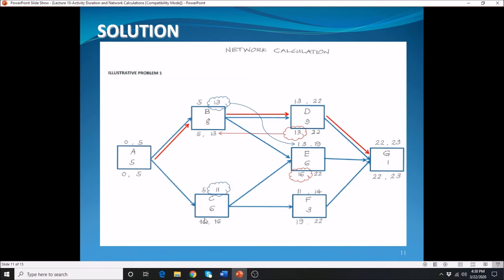will give you 10. Alright, so as you move on to your A, it is connected by two arrows, this one here and this. So we need to choose between 5 and your 10. Whichever is the minimum between the two will be the value that you're going to carry over. In this case, 5 is the minimum. 5 minus 5 equals 0.